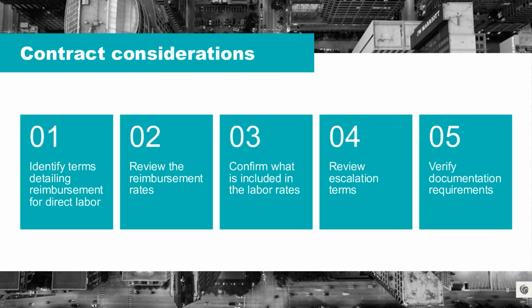Confirm what is included in the labor rates. So clarify inclusions and exclusions. Labor rates always include more than just wages. They bundle together fringe benefits, payroll taxes, insurance, and sometimes overhead and profit. So confirm what's included to understand what you're paying for and avoid duplicate charges.